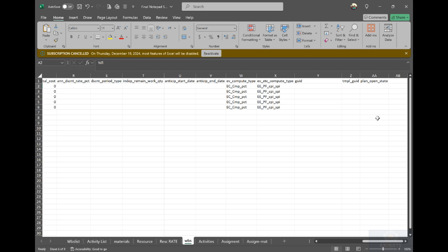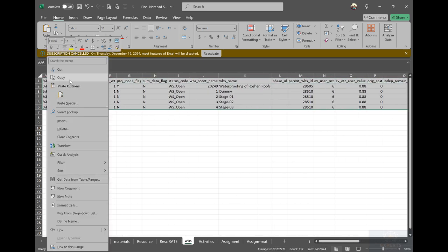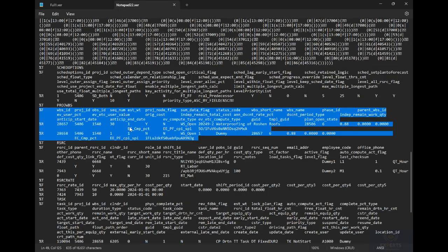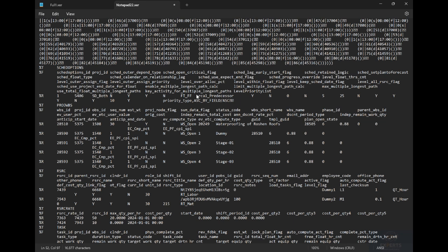After that, I will take all this, copy, and I will go to my notepad and paste. So you will find it like this. Only take care about the spaces itself. Whatever space you find, delete this space to keep the structure without any change. This is the important point for the notepad, and this is the weak point of it. So this is very important. So just putting everything in place, copy paste. Whatever you take, you will insert here by copy paste.